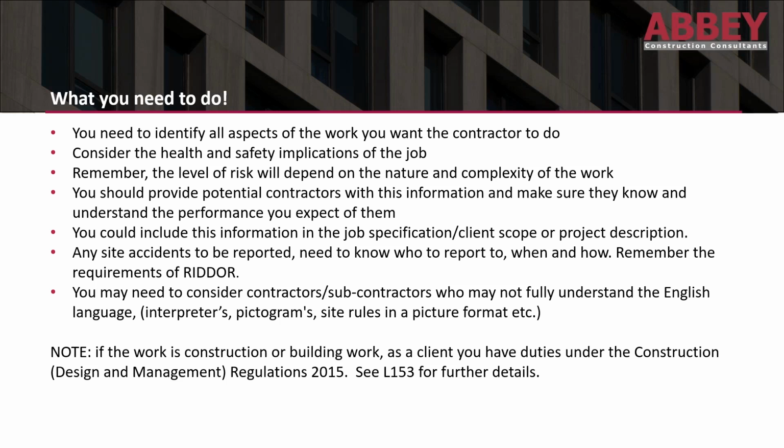Also, site accidents are to be reported. You need to tell the contractor who they're to be reported to, when they are to be reported, and what mechanism you are using for reporting them. So if an accident occurs from a contractor on your client's site, then you would need information of who the contractor makes contact with in the client organisation.